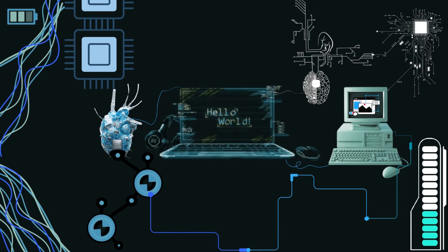Cost and progress: the radius of the spiral, the distance from the center of the spiral to the current point, shows the cost of the project so far, or how much money has been spent. Angular dimension: the angle, how far around the spiral you have gone, shows how much progress has been made in the current phase. The spiral model is divided into four parts called quadrants.